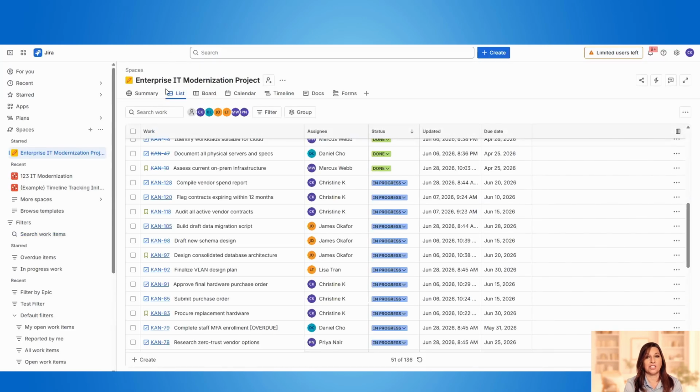Now we can do a variation of this for checking for status mismatches, or tickets in progress that have had no recent comments or updates. These are tickets where the status says one thing, but you know from a status meeting or talking with someone that the issue is closed or has encountered some type of roadblock. Now, again, ask the assignee directly, don't assume, but get an answer before your next sprint review so your board reflects what's actually happening.